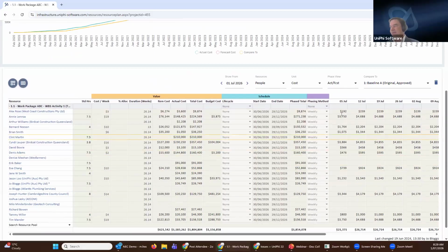And these are the individual costs as well. And so all of that is being rolled up into the total cost of the activity, as you can see down the bottom here, over time, but also as a total. And that's what's being displayed as the actual cost of work performed in the dashboard from the beginning of the session.